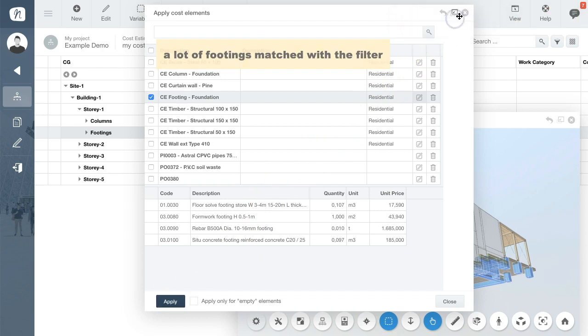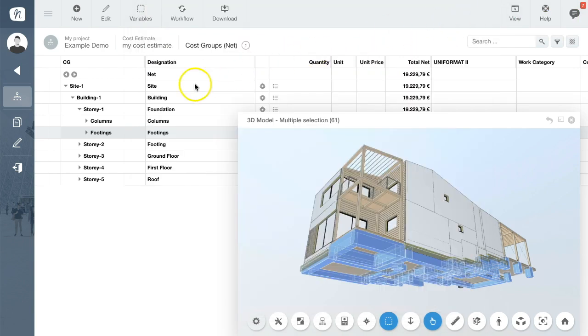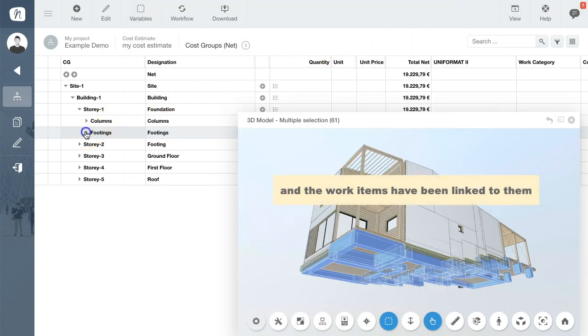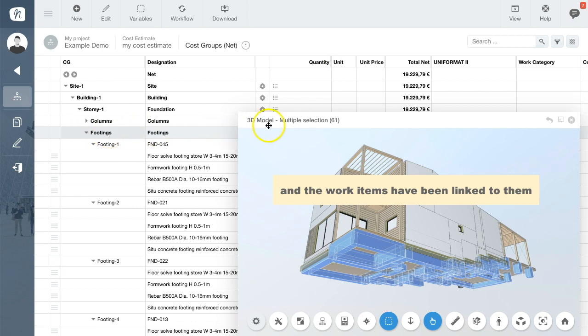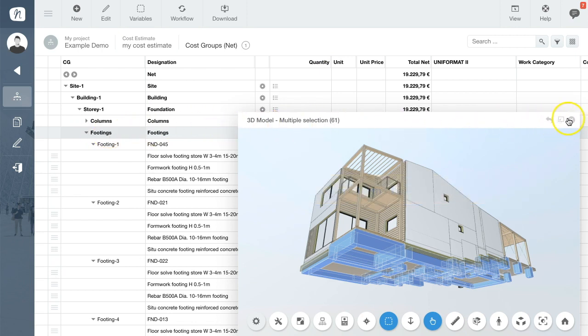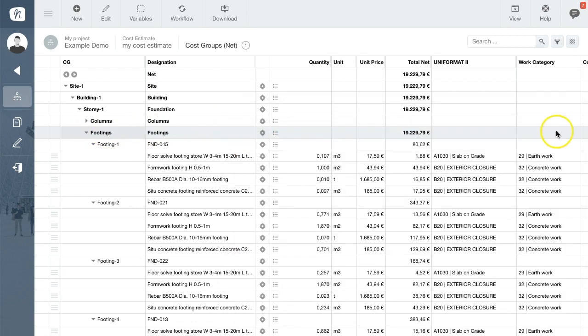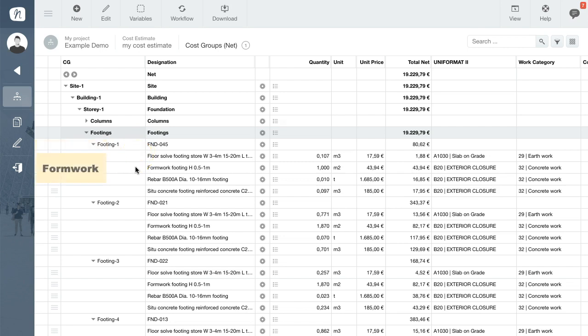Let me just close the viewer. Now we have a list of all work items connected to a footing. Earth work, form work, steel and concrete.